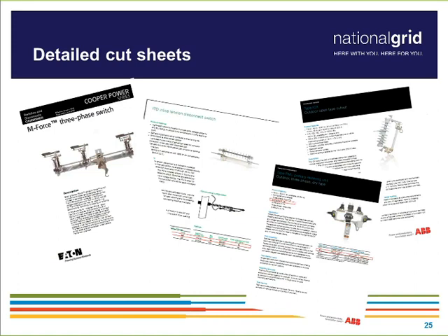greatly supports our review process, and if you provide them sooner in the process with your first design package, that's okay, as long as they don't change. And if anything does change, if you promptly submit the new detailed cut sheet for us to have on file and to review for approval, the faster we get those cut sheets, or the sooner we get them in hand as a full package, the faster we can advance to the next stage.